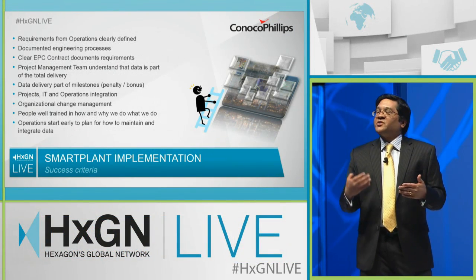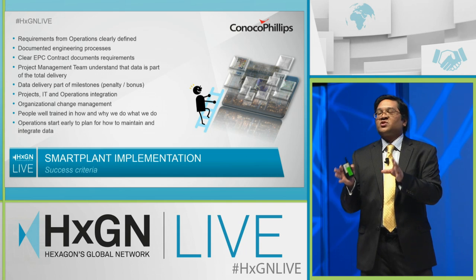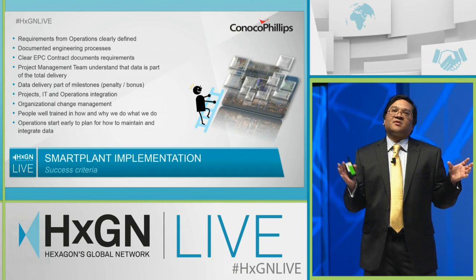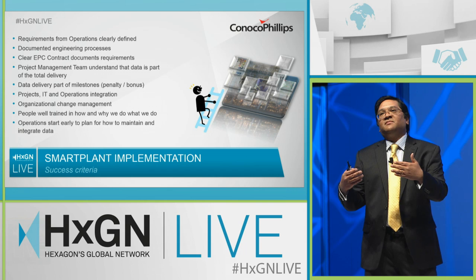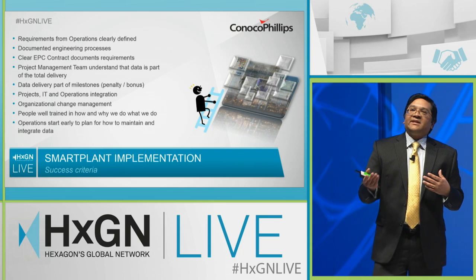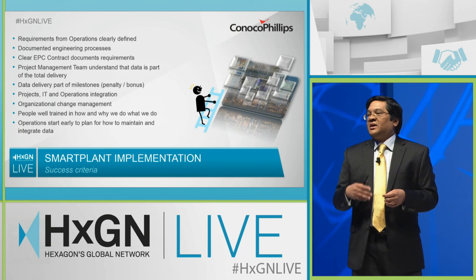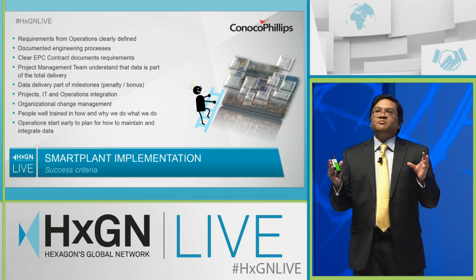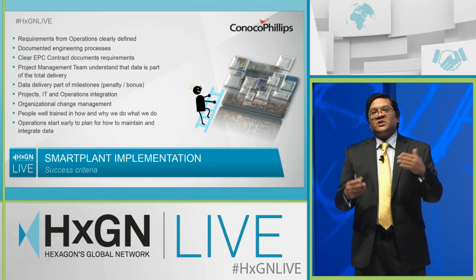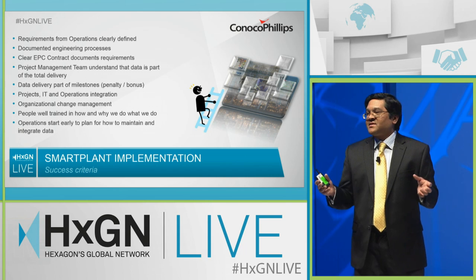Your project management team has to understand the benefits of data delivery and understand that data is part of the project delivery just as much as the platform itself. The data is just as important as the physical hardware. And that's a message that has to be reinforced on an almost daily basis to the organization. We make data delivery part of our contracts in terms of our penalty and milestone structures in the contracts now. We want to have integration between our various functions at a very early stage. As I mentioned, we can't have functional silos anymore if you're trying to develop integrated data for the life of an asset.